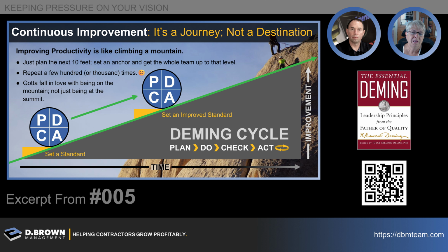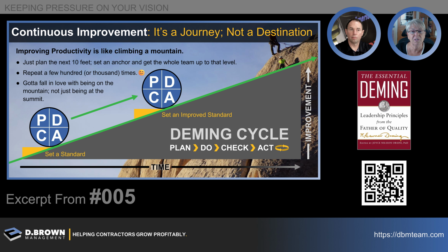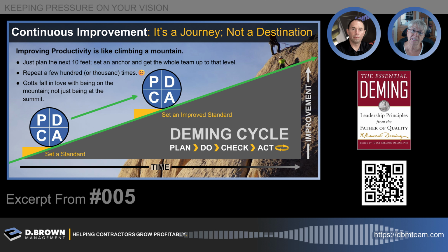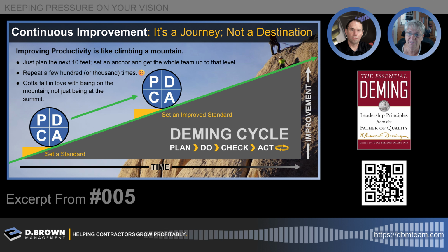But it really is about making sure that you're using and working toward that standard every single time. We would have divisions in different parts of the country that would come together to do a joint bid review. They may have thought of the process on how to build the work differently, but how they reviewed an estimate was exactly the same, because everybody just used the same standard, the same checklist to that standard.